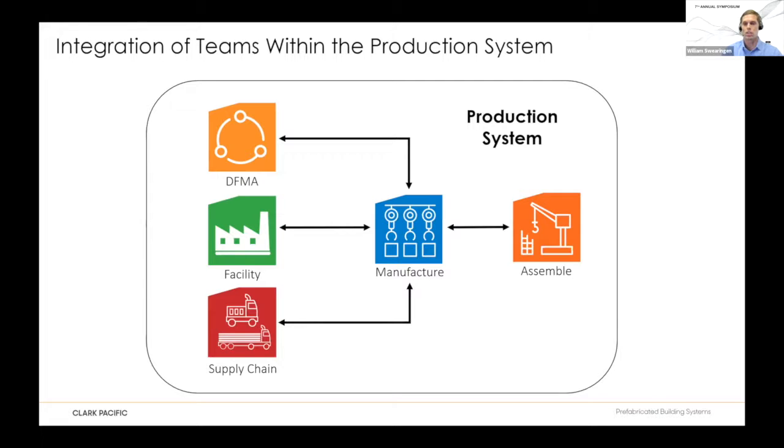We're using a Scrum framework, which, if you're familiar with it, is mainly used in the software industry, focused on two-week sprints. It allows our teams to integrate daily, understand what needs to be done, and balance workflow between the teams, so individual teams and members don't get bogged down and miss a delivery window. It's almost an operations science way to incorporate into how we deliver designs into the manufacturing process.